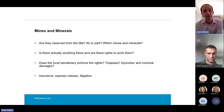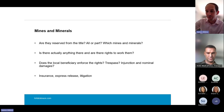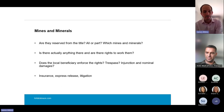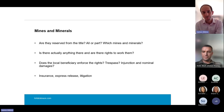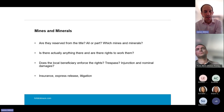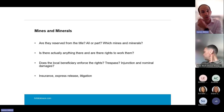If you have a title where mines and minerals are reserved, it's not something that can safely be ignored depending on where you are and the attitude of the owner. It may be sensible to try and negotiate a release — we have had mines and mineral owners agree to release their rights for health schemes. Or it may be a case of identifying the risk and making sure it's reported in a risk register. Either way, it's something to consider on that initial due diligence of what the development site is and what constraints will apply.